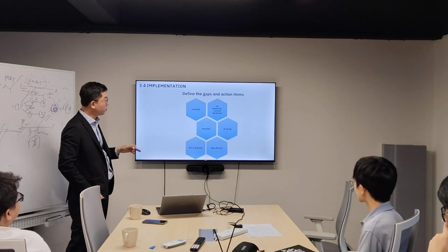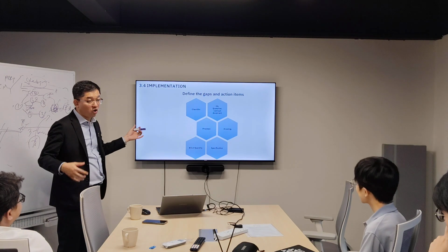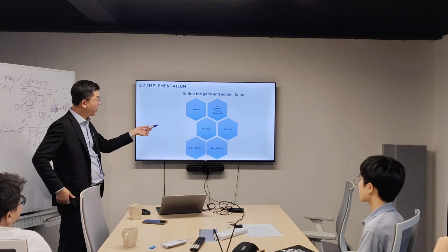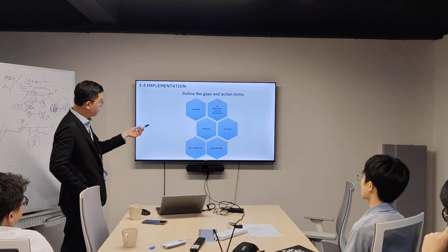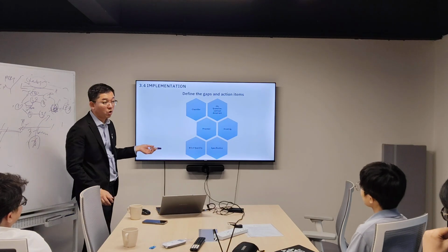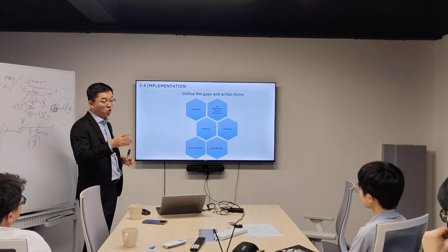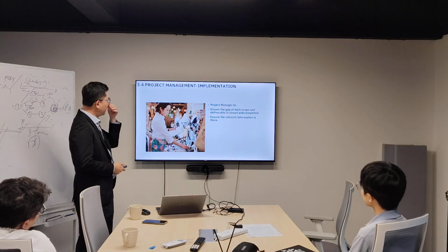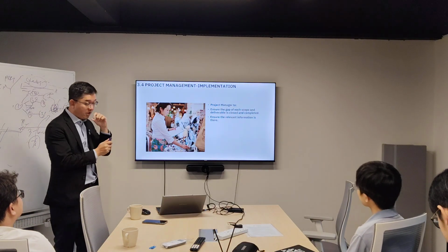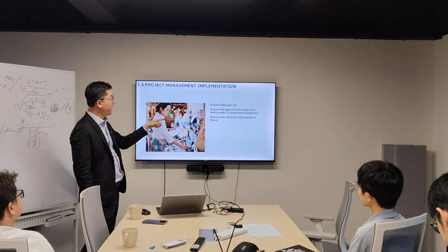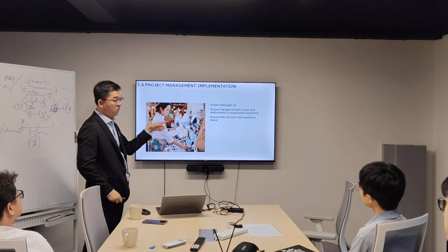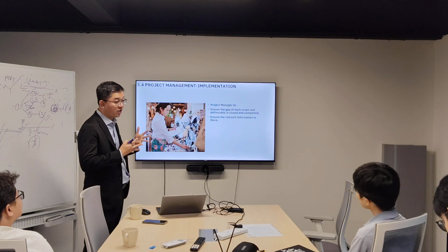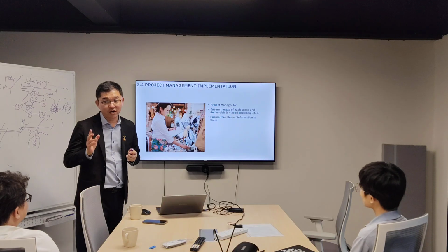During implementation, we also need to have this checklist in order to close the gaps. So, for example, we need to have a PO, we need to know what is the contract, we need a drawing, we need a proposal, specification, BQ, in order to make sure you know what the contractor needs to do. Okay? So during the implementation stage, a project manager needs to ensure each gap of the scope and deliverables is closed and completed. Okay, that's why I said just now.